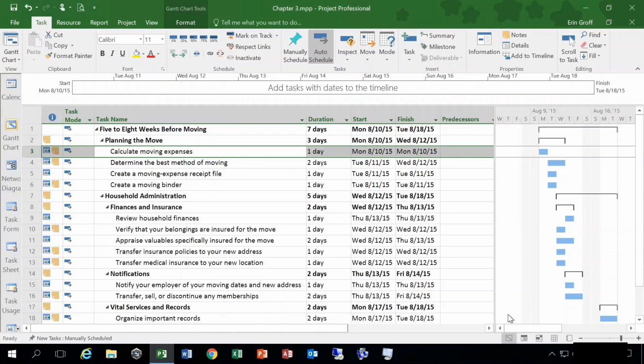By default, whenever you link 2 tasks in Microsoft Project, a simple finish to start dependency is established between them. This means that the first task must be completed before the second task can begin. The links between tasks are indicated with arrows. If your project is simple, you might link all of the tasks together into a single chain, better known to project managers as a path.